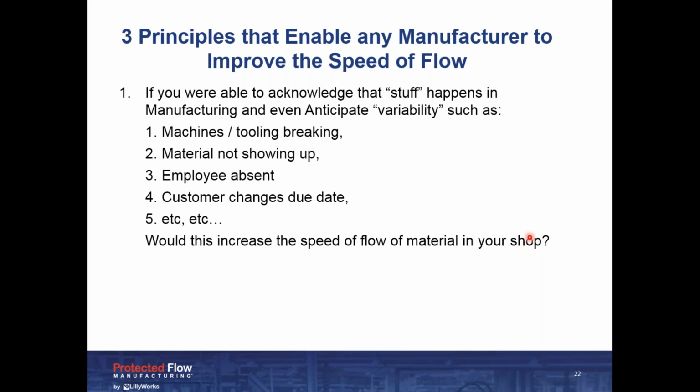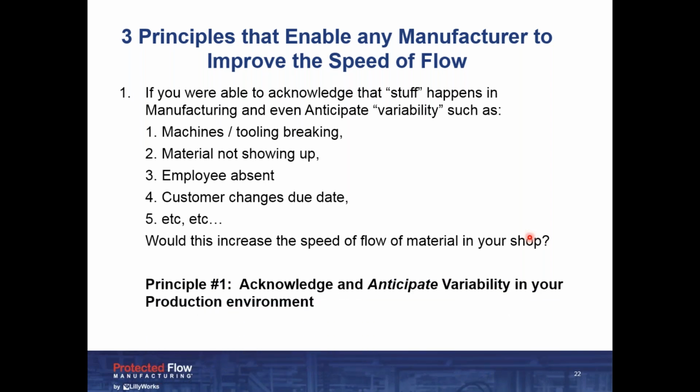Why would you plan for the last operation? Stuff's going to happen, right, in between the due date and when you release that job. So why would you release it that tightly? We're actually planning to finish the last operation the day it's due. You want to anticipate variability because things are going to happen. You want to have that time protection there to anticipate what's going to happen in the future. Okay, even though you may not know exactly what that stuff is, but stuff is going to happen. That's the first principle.